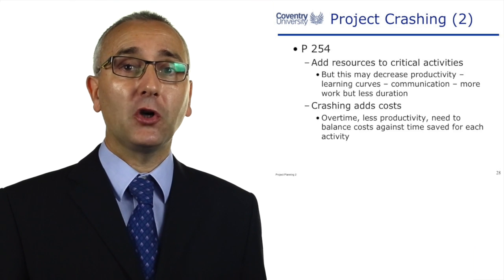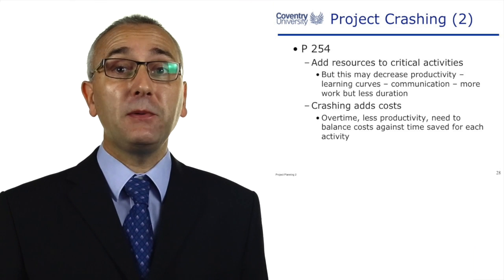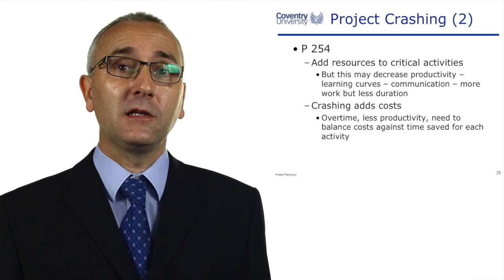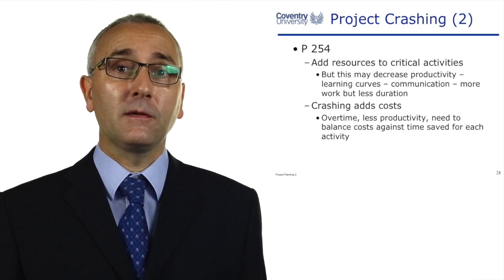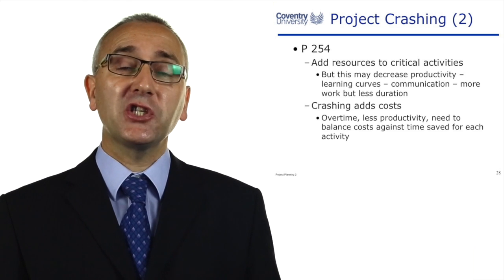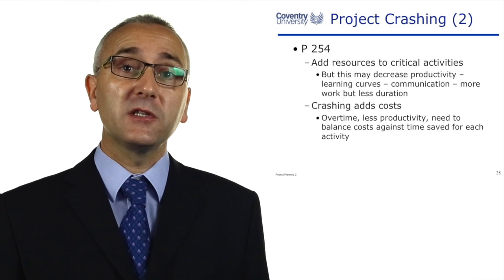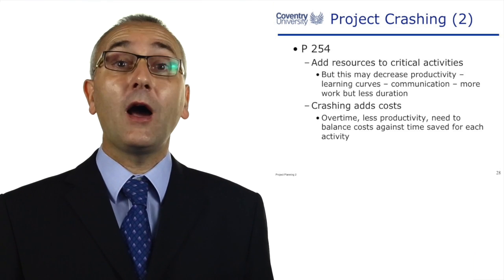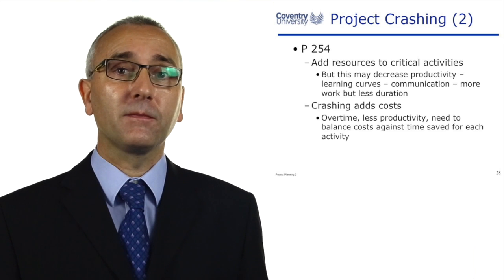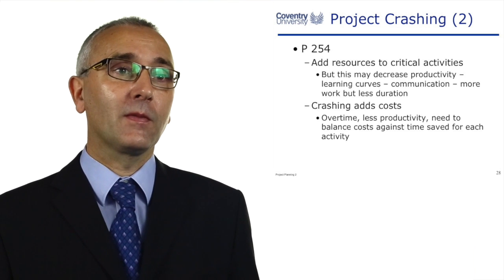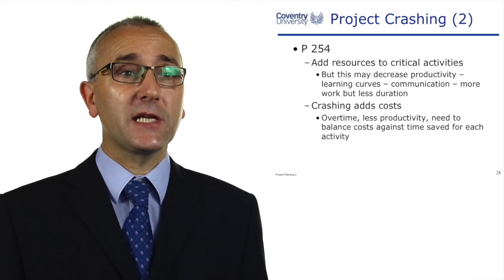Let's put two people on the job. Now those two people have to communicate with each other, so there's now 40 hours of work. There's a chance we might finish it in three days, but there is more work and more cost associated with the task. Crashing adds costs, Gardner points out.